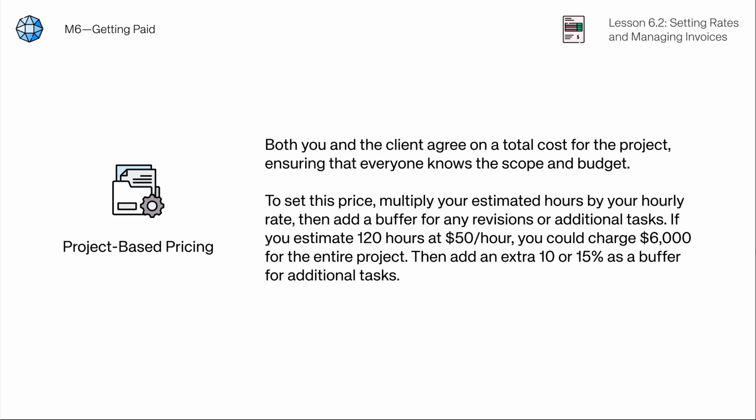You could also use a hybrid model, which is your fixed rate, for example, in this case, $6,000 for a set scope, and then $50 per hour for anything extra.